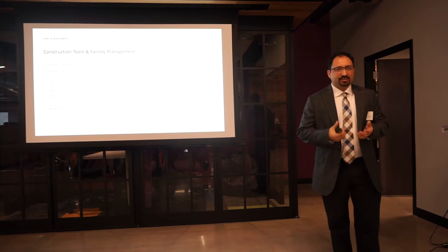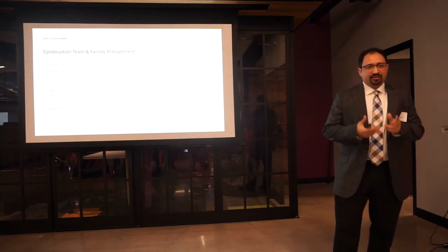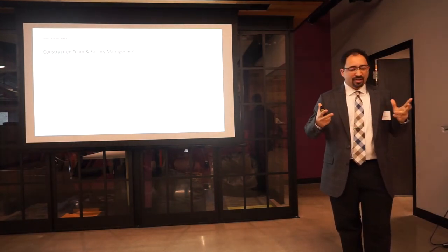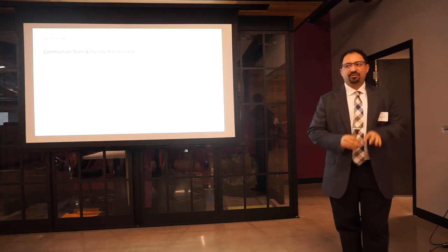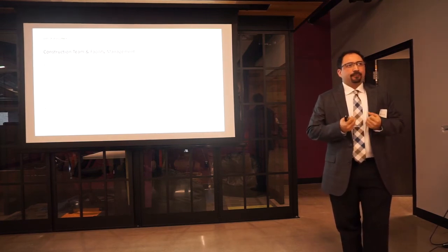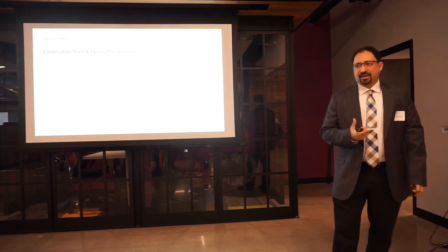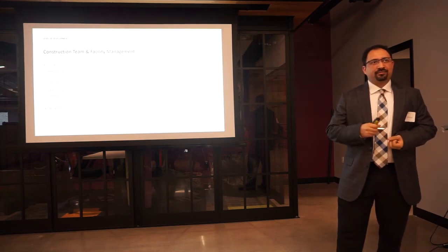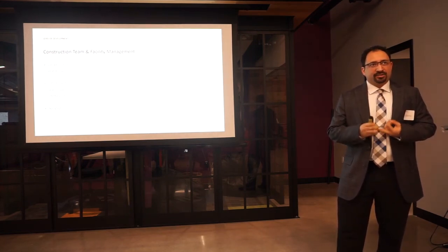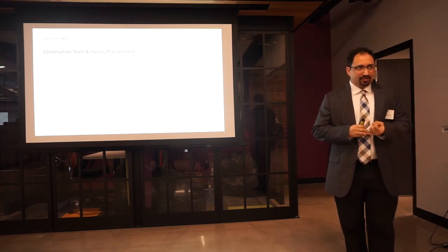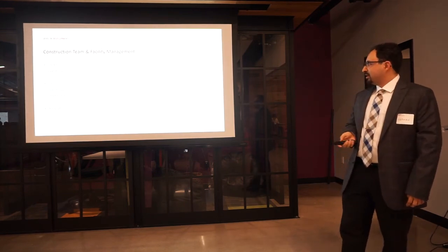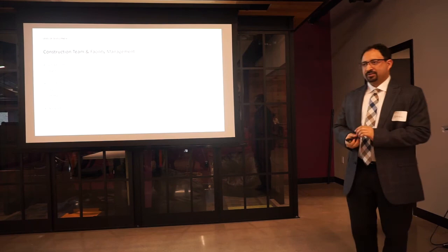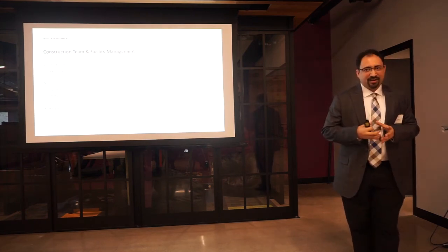And once we had that all established, we passed it on to the construction management team, and they took that model, and whatever they substituted, whatever they've bid out for certain items, they would insert their own information into the project. So that AON unit is now a carrier unit. So they would insert the information for warranty as well. They would insert the information for the installation date, the part pieces, all this information, which I'm going to get a little bit more into a little later on. And level 500 is, in the end result, we end up with a level 500 model.